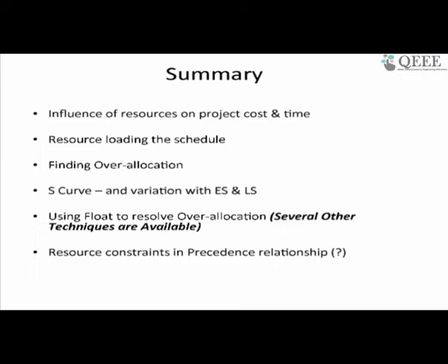We finally talked about resource constraints and precedence relationships, what we just discussed as far as the bridge problem is concerned. I put a question mark here because you have to be judicious in selecting whether you want to put the constraint in your precedence relationship or not. If you put it, you're locking yourself to those resources in the project. If you don't put it and you don't load resources, then you're in a problem. So you have to balance it out and make your decision with the knowledge of what you're doing. Don't just follow a procedure without understanding.